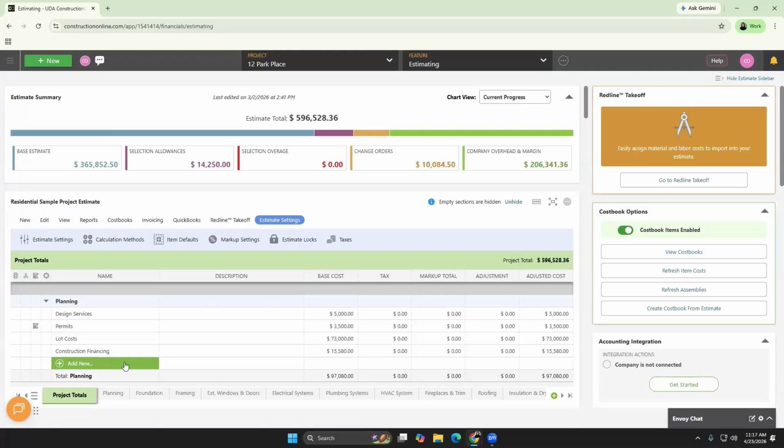You would be able to go in and do a correction to your own numbers while not changing what the client has approved. In that same vein, let's say we are working with the opposite. In the fixed fee contract example, let's say we get a special discount on lumber and we actually get 20% off our lumber purchase, maybe for loyalty, maybe we happen to hit a really good deal. Because it's fixed fee, the client still had agreed to pay X amount of money. So you can put in a negative value into the adjustments to say, I actually expected to spend more on this. And then that's going to contribute to the profit that you're making on that individual line item. So, really great ways for managing all of those types of things.